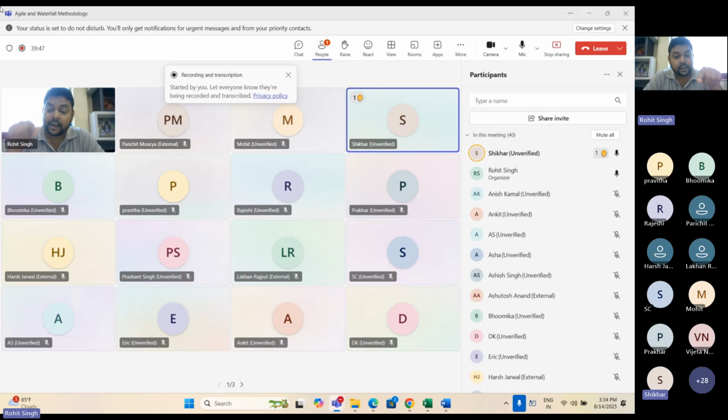That is why I clearly mentioned that when we are doing agile, when we make a BRD or any document, we add a constraint in it for the client, which the client approves. Constraint is a topic, a syntax, content that is available in the BRD. Constraint means these are the things which I cannot control, as a software development company.